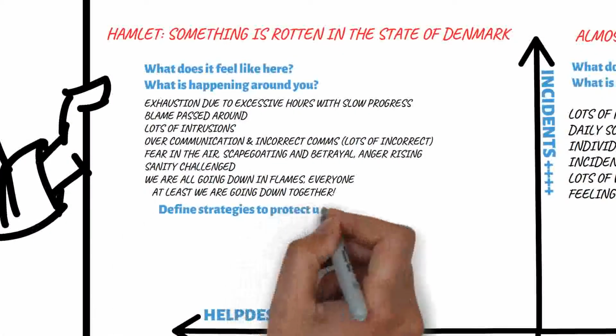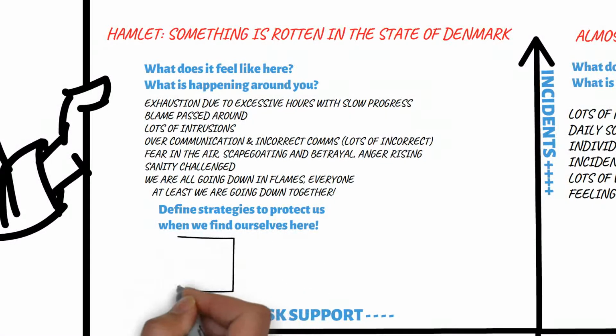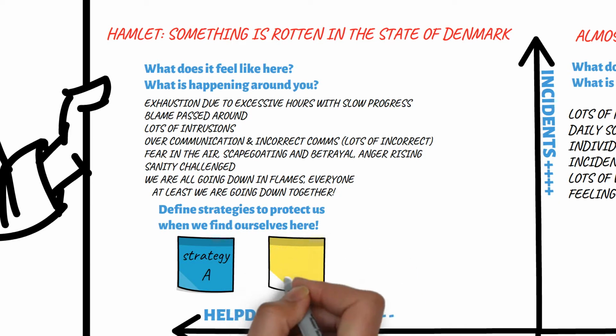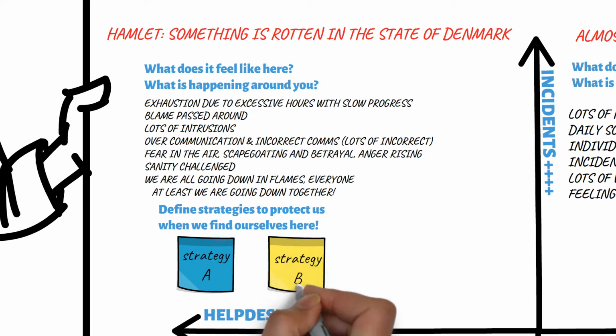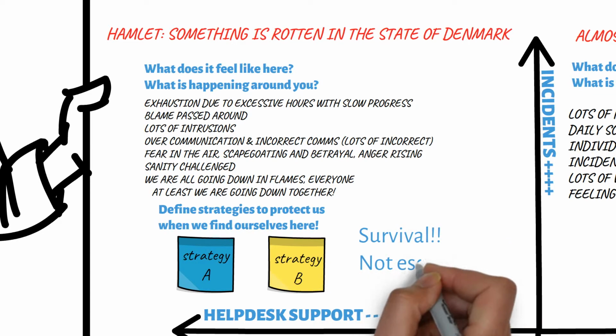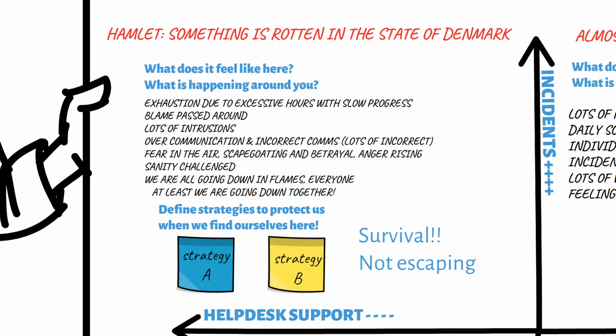Now ask each group to brainstorm some strategies that would help the group operate successfully in the quadrant described. Strategies must focus on surviving the quadrant and must not focus efforts on trying to leave the quadrant. Remember, the team has identified they've got zero control.